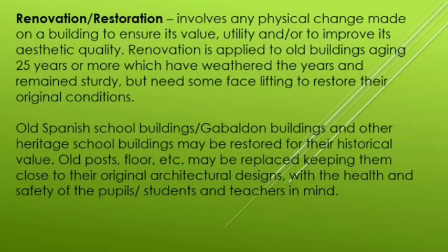The last one is the renovation or restoration. Renovation or restoration involves any physical change made on a building to ensure its value, utility, and or to improve its aesthetic quality. Renovation is applied to all buildings aging 25 years or more, which have weathered the years and remained sturdy but need some facelifting to restore their original conditions.